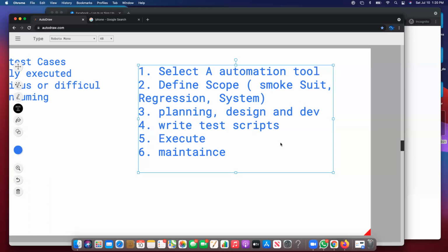Let's go for it. The next thing I will be doing is defining what should be automated first, because I cannot just start automating test cases without a proper reason. If I can automate the Smoke Suite first, the team can already use it to determine if the application is healthy. If I can do something that will be used immediately, that's better, right? Then I will build the regression suite. And so I will have my roadmap where I say, okay, the next 2 months I will be doing this, the next 2 months I'll be doing that. After that,